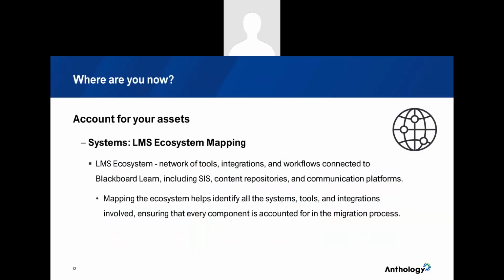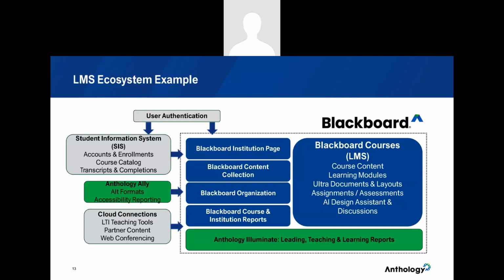So accounting for your assets, it is always very, very important to really understand your learning management system ecosystem. So what are the network of integrations and tools that come together to support your online or your web-supported courses on your campus? We like to map these by actually drawing a diagram to make sure that we're being very proactive about the different touch points. So you can see on this next slide here that this is an example of an ecosystem.